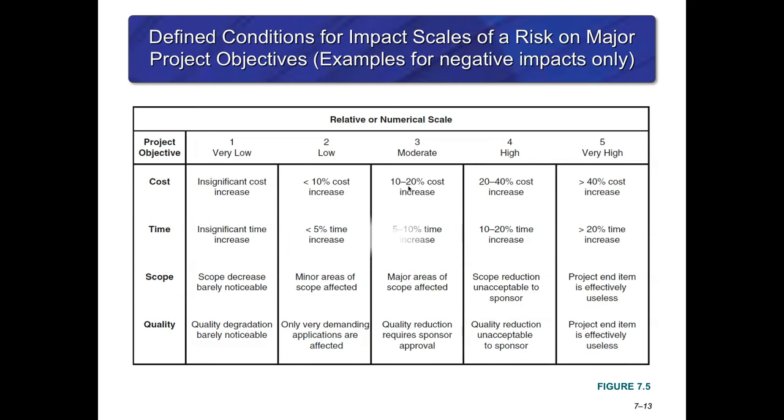All right, so as we move forward, one of the ways that we can put this all together is looking at what the negative impacts of each one of the pieces will be. And so what we have here is a Likert scale that goes 1 to 5, with 1 being a very low impact and 5 being a very high impact. And generally, the relative scales or numerical scales that we gave these allow us to look at each of the pieces in conjunction with one another.